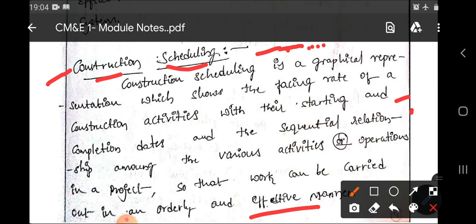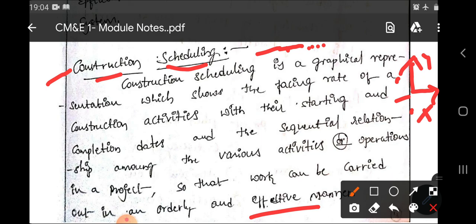Scheduling will be shown in a graphical way with two axes — the Y-axis and the X-axis. In the Y-axis, the number of activities involved in a project will be shown, and the time required to complete each particular activity will be shown along the X-axis. Combining these, we can get the entire duration of a project. This is about construction scheduling in a general way, and our main aim is to find out the duration of a project.